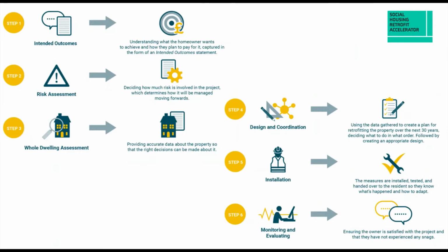Effectively, what it's doing is trying to stop all the gaps that were occurring in the retrofit process during CESP and CERT that were allowing bad decisions to get quite far down the line before someone flagged them, because very often it was us technical people sitting way down the end of the line who got engaged way too late. By the time we showed up, we said, look, there's no budget left. There's nothing we can do to fix what you guys have already done. And now we've got a project that fundamentally doesn't work. PAS2035 is about fixing that project management process to make sure that we don't get that far down a project without key things being considered and resolved at the right time.